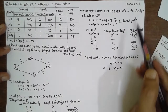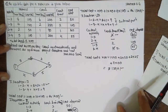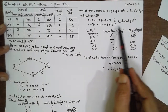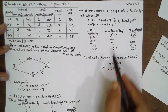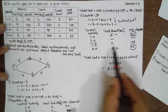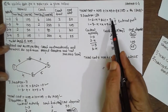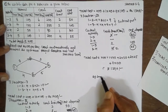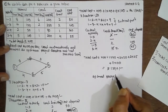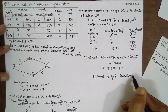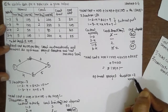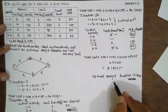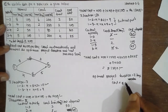Rupees 1290 is lesser than the previous value. Further crushing is not possible because we have reached the optimum limit. After 7 days it is not possible to crush further because there is no feasible critical path. The optimal project duration is 7 days and the cost is rupees 1290.